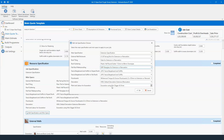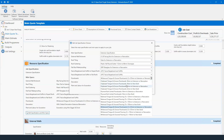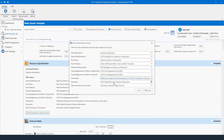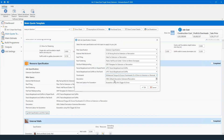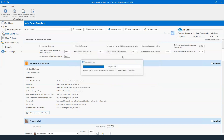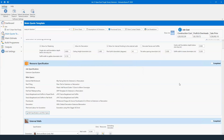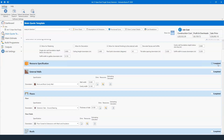Fascia boards and soffits — since we're not decorating them we're presuming UPVC, already in there. For suspended floor sections you've got different TNG options: chipboard, plywood, redwood, whitewood. For decoration we'll leave that as the default. For plant and labor for excavation — in a perfect world you'd get a mini digger on site, but the likelihood is it'll be a manual dig. Once you're happy, click OK and it applies those changes — my cost has gone up because I made the brick more expensive. Then click 'Completed' on the right-hand side — this has no impact on the price, it's purely for your own tracking.